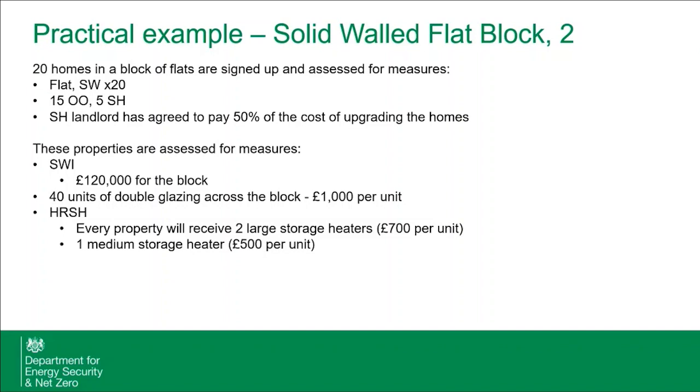In order to know how much headroom you do have, one thing that you could do that might be sensible, although it might be a bit fiddly, is because a lot of the hard coding is built into the actual batch form that's on gov.uk, every time you want to put in new measures, or add another home to the properties, or add more homes to your project, you can just cumulatively fill in a single batch form.